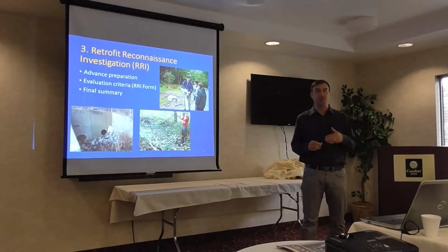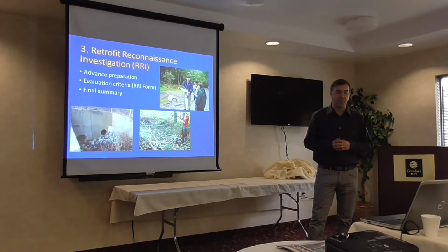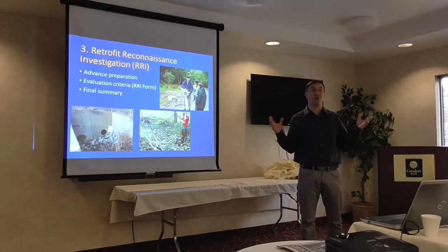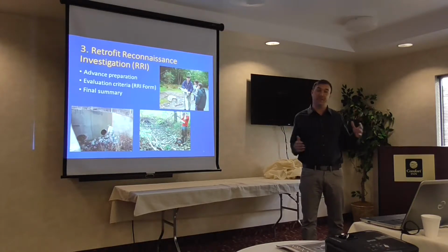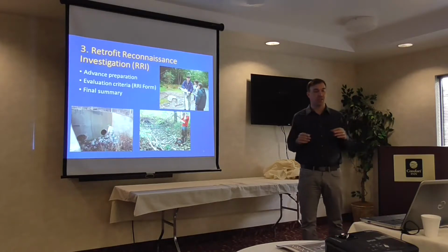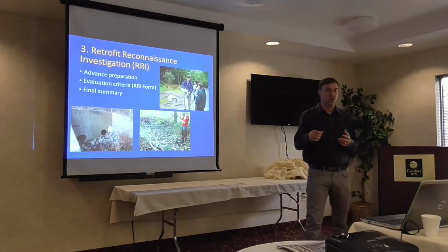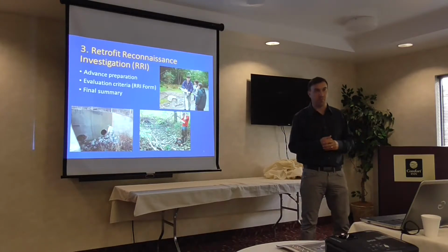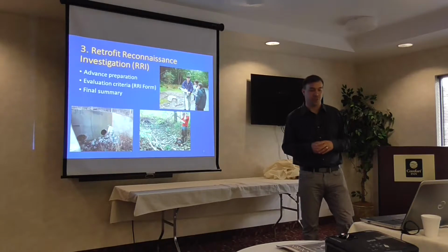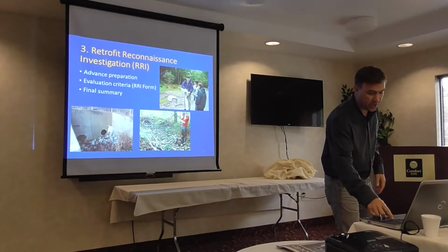And then as you complete your data collection in the field, you'll probably have some sort of final summary as to what you think this site's capable of doing. So not all sites are going to work. Some sites you might get to and quickly realize we have utility conflicts, land ownership conflicts. So not all sites are going to work, but you need to typically get on the ground and start to look at things like the outlets, inlets, where there might be visual indicators of infrastructure, that kind of thing, to start to identify what is our opportunity here and start to collect some of that data that's in that form.